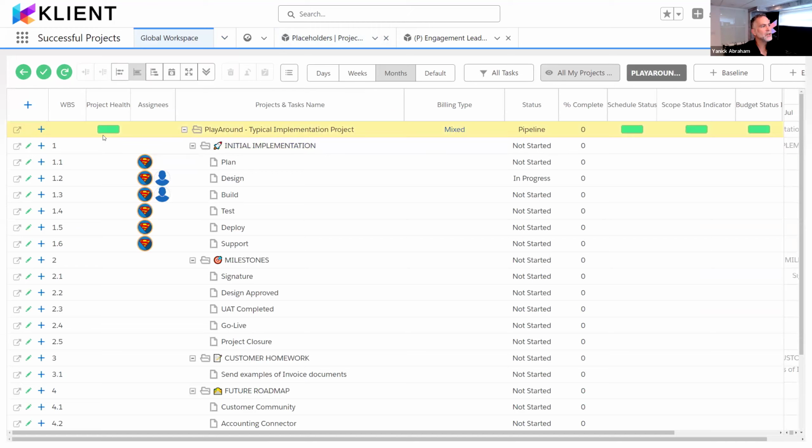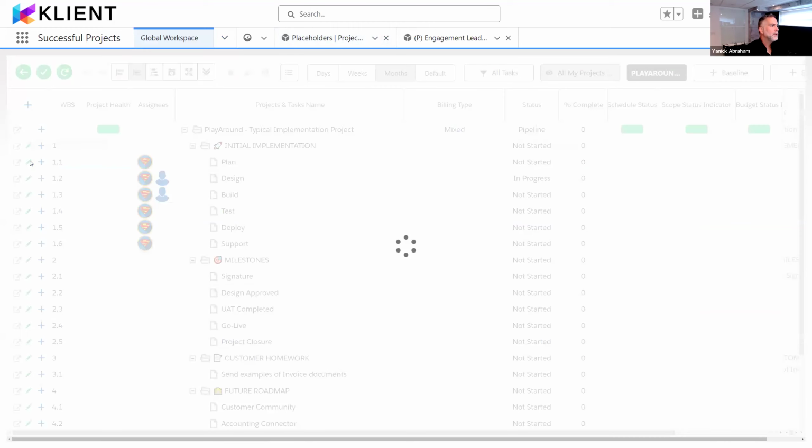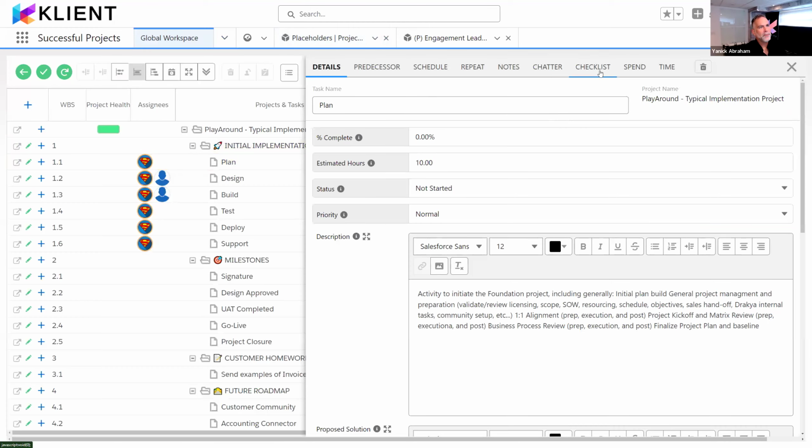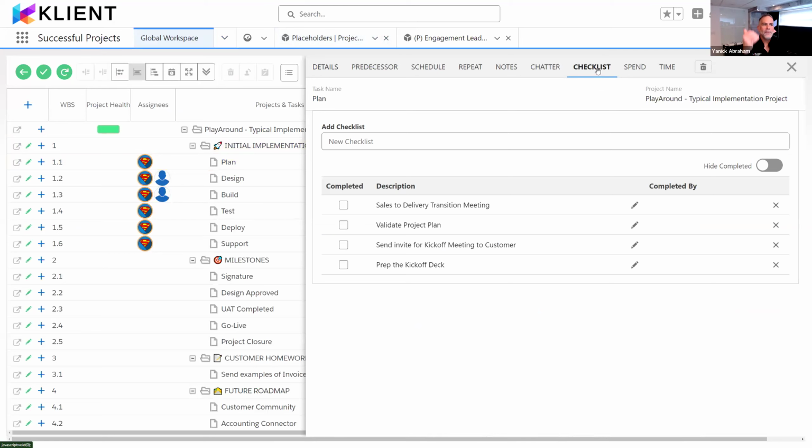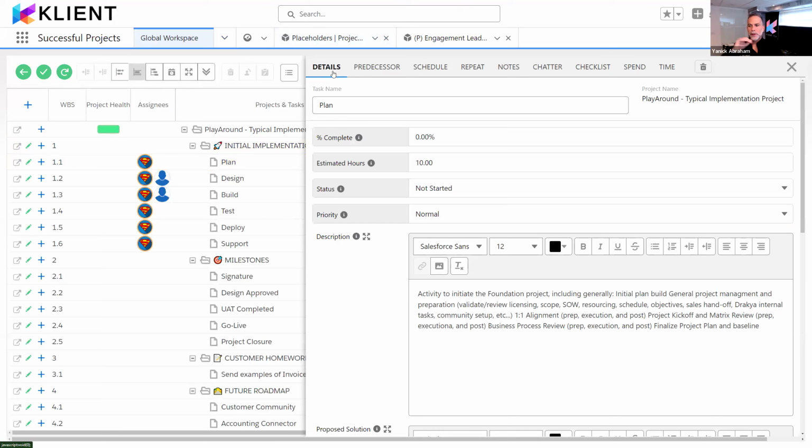And let's look at the checklist now. From the right side panel, if I open up the checklist tab, I can see I've already got checklists. And the biggest difference, there's three things: there's the task, there's the description of a task, and then there's the task list, the checklist. So the task itself is big enough that you can log time on it, and it's not too small that it's a micro thing that you need to do.